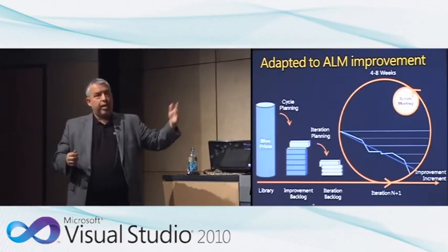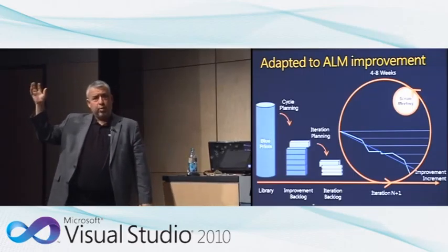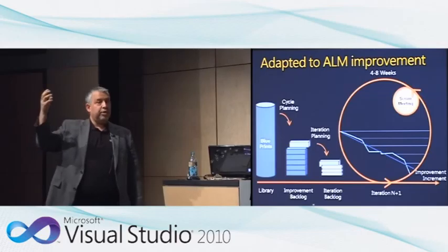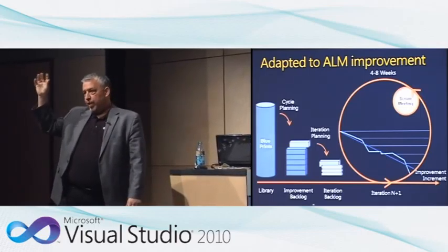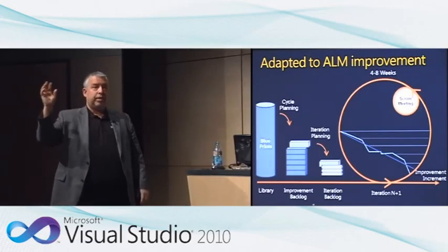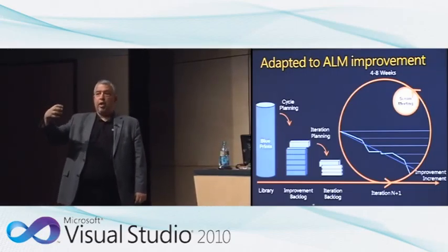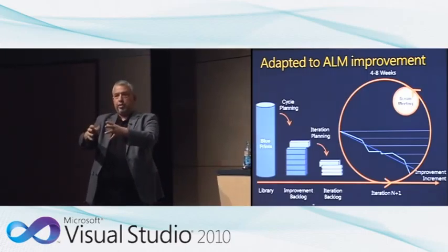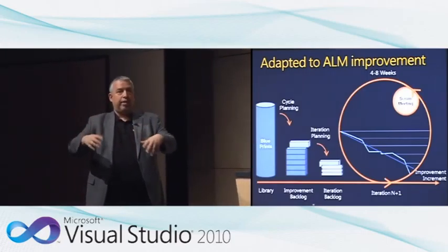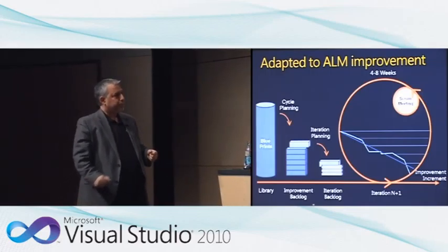The same way, we're going to run our regular meetings, and at the end we'll deliver an increment, for us instead of a potentially shippable product increment as we have in Scrum, it's actually an improvement increment. For us, an improvement increment is something that the team is using on a live project for real. It's basically done. They're using it and they're starting to use a practice on their own.